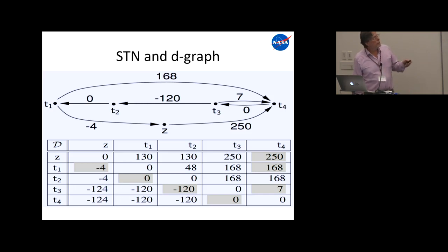The only preference is to follow the directed edges in the graph to find the shortest path. But if you had two paths with directed edges, where one is negative and one is positive, does the sign play, or the magnitude of the path? Well, it's a summation. Whether it's positive or negative, it's a summation. So you're looking for the lowest cost summation. So, right, again, these values represent the bounds of the original problem.